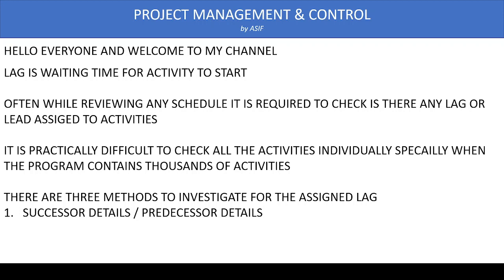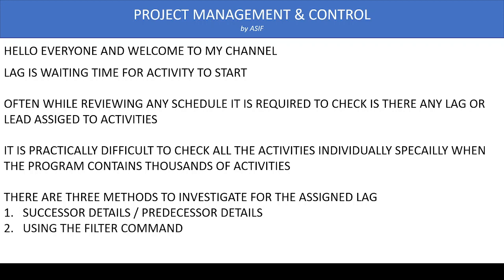This first method also requires going through activities one by one, which is time consuming and risks missing some activities assigned with lag. The second way is using the filter command, but in Primavera P6 the filter is not powerful enough to easily separate activities assigned with lag.